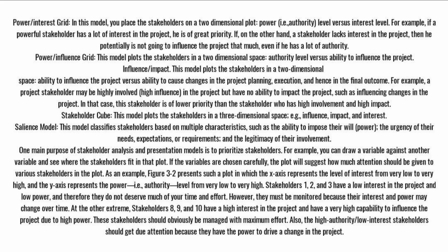However, they must be monitored because their interest and power may change over time. At the other extreme, stakeholders 8, 9, and 10 have a high interest in the project and have a very high capability to influence the project due to high power. These stakeholders should obviously be managed with maximum effort. Also, the high authority/low interest stakeholders should get due attention because they have the power to drive a change in the project.